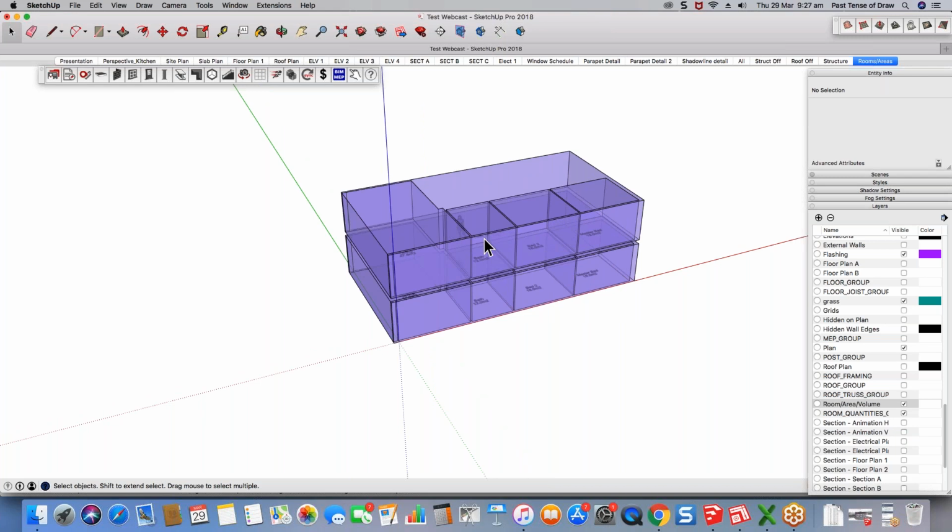So again, although we hate estimating from square meter and square feet, and we really think it's costing every single one of you time and money, for these very preliminary feasibility studies, I can see the value. So the way that you can price your different spaces is via the category. Category being bedroom, living, kitchen, dining, bathroom, space, outdoor, etc. And you can give a square meter or square feet rate.